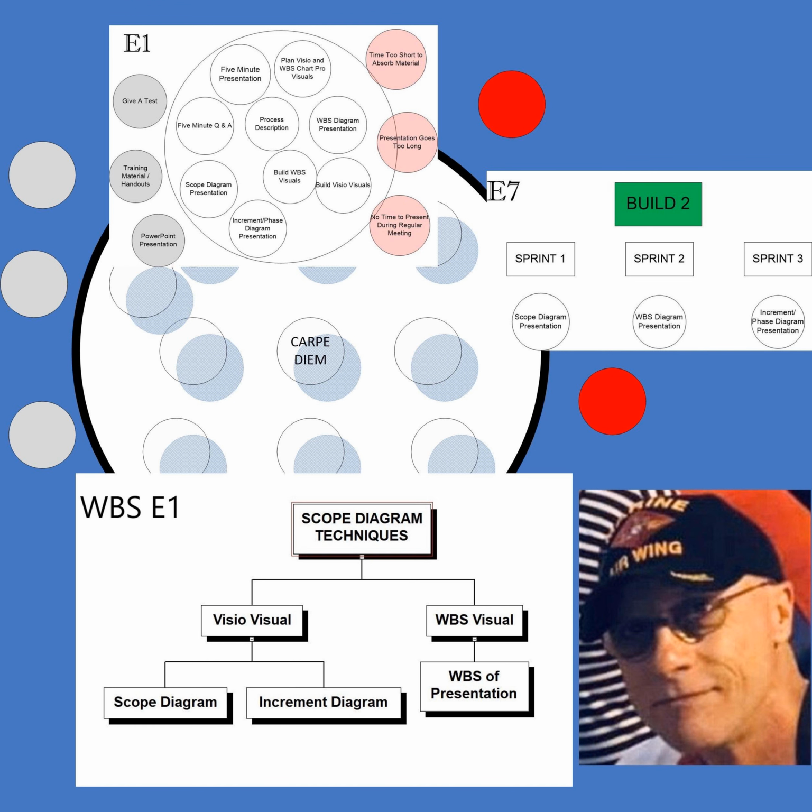Increment 1, procure network for X, procure network cabling vendor. So that's now, remember, procurement is, you're just trying to get an idea on the left there, the column there, you get an idea what you've got to procure, and now you can repeat it, so where you're going to do it. Increment 1 is actually the processes you're going to do, and of course, some of these will be the headings, and you'll have all the tasks under there in order to get these things done.